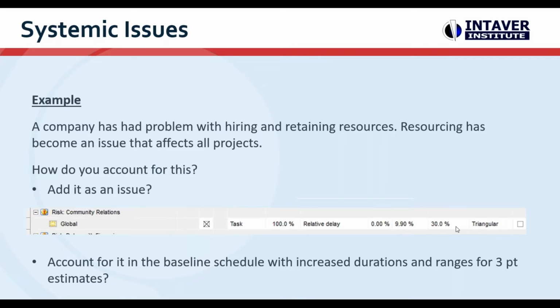But it is a question, because there are two schools of thought on that. There's actually a third one that takes all of the issues and builds them into, I would call them systemic issues, puts them into factors, and develops a parametric model. We'll call it parametric modeling, but it's basically a statistical distribution, and that is used to replace all of the 3-point estimates. So we don't put in base, low, and high. We just put in one large parametric distribution that's occurring 100% of the time.